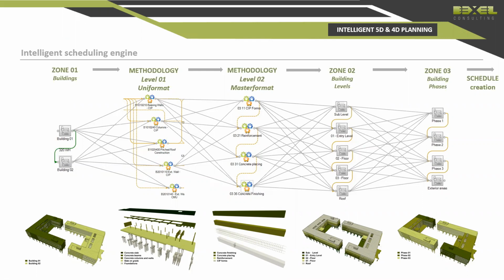Of course, sometimes we have classifications but still don't have the prices from the market, and the clients want to have the schedule or some kind of presentation of how the construction will look as soon as possible, even if they don't have the full cost analysis. In that case, you can also create methodologies without the price. You can still have your classification without the price, and still use these items to create your tasks for the schedule.